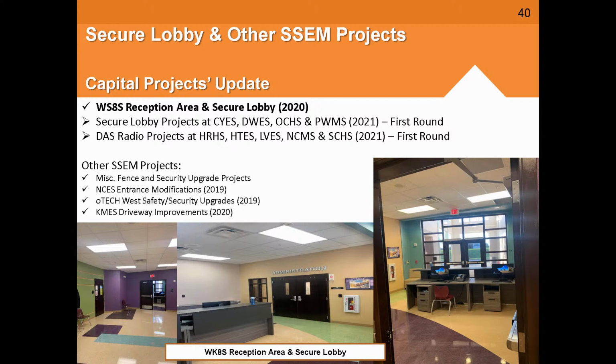So we've teamed up with our SSEM counterparts, and we went out for an evaluation of all of our campuses, which we completed in 2018. We found all the deficiencies. The campuses that were all okay are fine for now. We may have to continue to check them in the future. The ones that are identified as a problem, which are 22 of our campuses, we've prioritized, and we are now going after a solution for those projects.